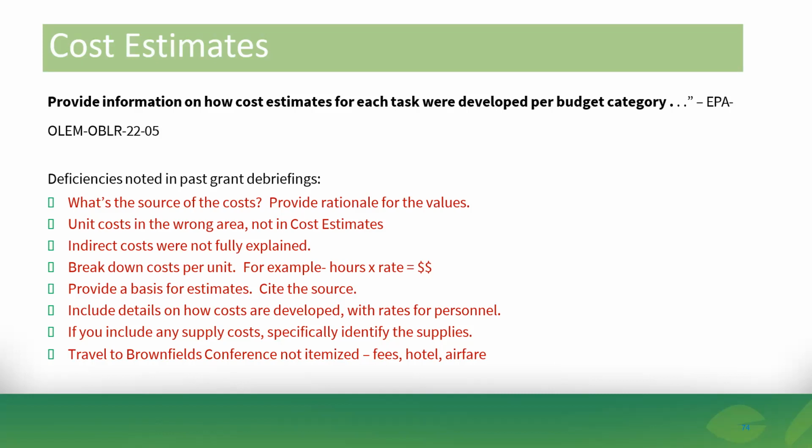And then a typical asbestos survey also ranges on building size, but between $2,000 to $10,000. Most building sizes can be assessed. Larger buildings, hospitals, and old manufacturing facilities can get well over that $10,000. Those are some ballpark numbers out there.